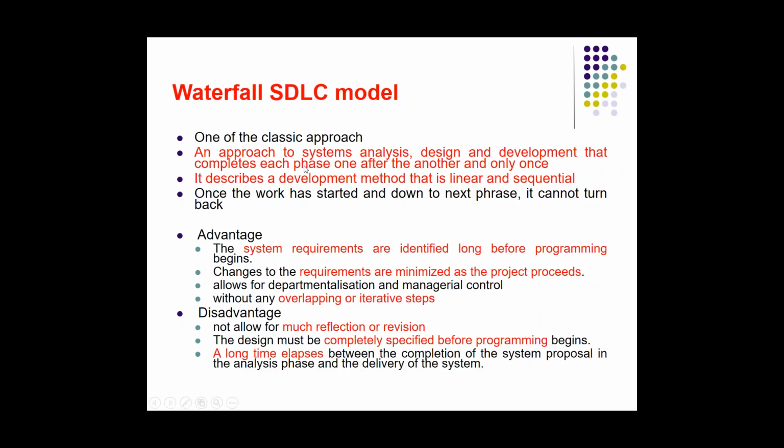So you do one phase, complete that, sign it, go to next phase. Complete that, sign it, next phase. Complete that, sign it, next phase. And you do that phase only once. You don't go back. This is a linear development method. It is sequential in the method.